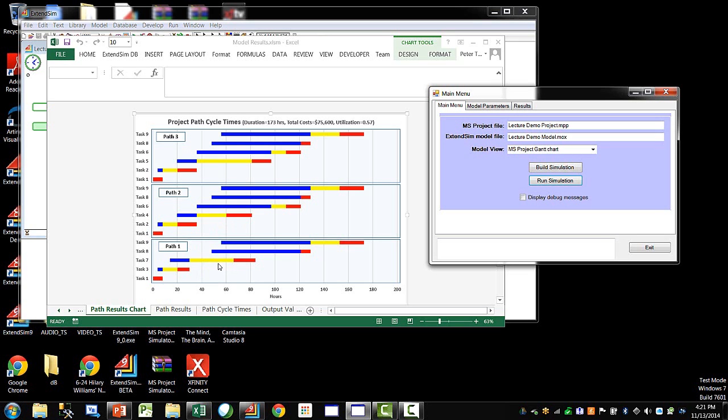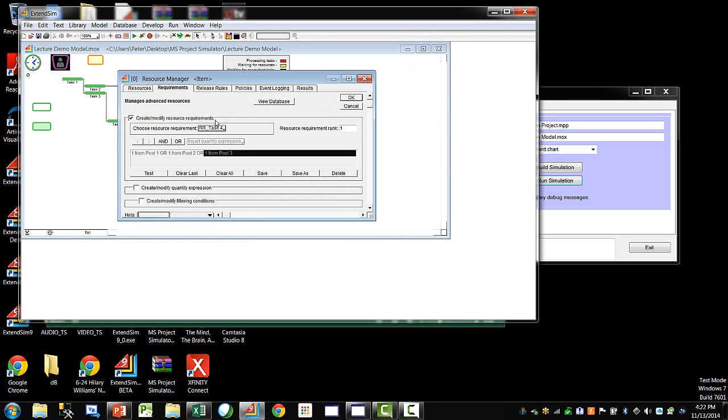So interestingly, there might be some interference going on here with what's happening because our critical path is now bumped up to path 3. Remember, originally in one of our baselines we were at path 1, we switched to path 2 as a critical path, we're now path 3 as a critical path. So one of the things we can look at is we were fixated before on task 7, and we thought, boy, that gave us some gains here for task 4. What happens if we go to task 7 and do a similar thing?